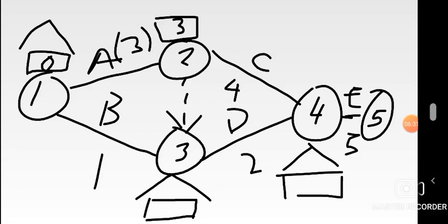Go to 3. On 3 there, what's happening? 3 as well has emerged from node 1, right? And if we check, there are actually 2 routes leading to 3, including the dummy. There's one route coming from 1 direct to 3, and then there's a route from 1, 2, through the dummy to 3. So even that dummy has to be recognized here. Let's check from 1 to 3. There's just been a day, so one day has passed. So it could be the possible starting time of 3 after a day.